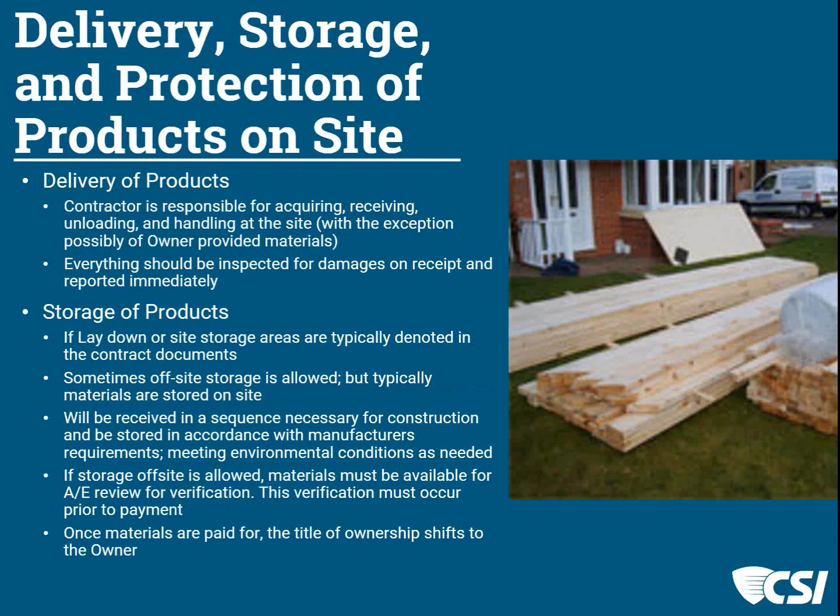If they are off-site, then there's a piece of the time that we as architects or engineers may need to go to the storage facility and verify those materials for payment, which is why they may be in a bonded and insured warehouse, so that we're sure that ownership shifting and that ownership, the title of ownership, is maintained. Because once they're paid for, they belong to the owner, and that applies if those materials are off-site as well.